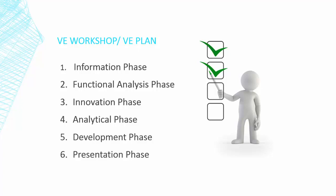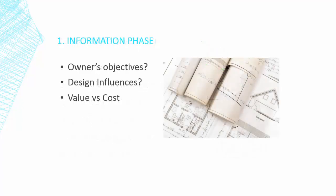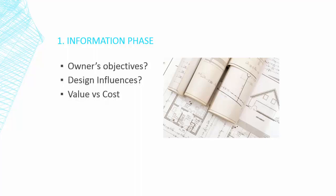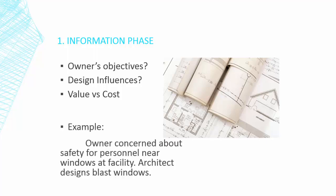We'll get started right away into the information phase. It's here we're going to define the owner's objectives and develop a thorough understanding of the decisions that have influenced the design on the project. Each discipline looks into each potential system in question and determines its value to the owner and the overall cost of the system. This phase will begin the process of narrowing down the VE targets. For our office building, for example, the owner is concerned about safety for personnel near the windows of the facility, so this has influenced the design of the project, so the architect designs blast-resistant windows.